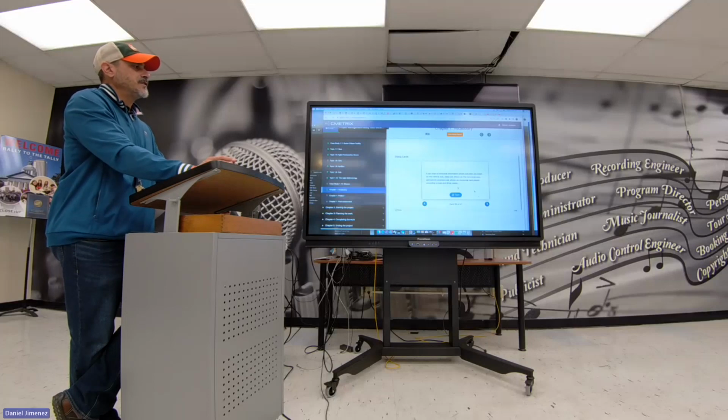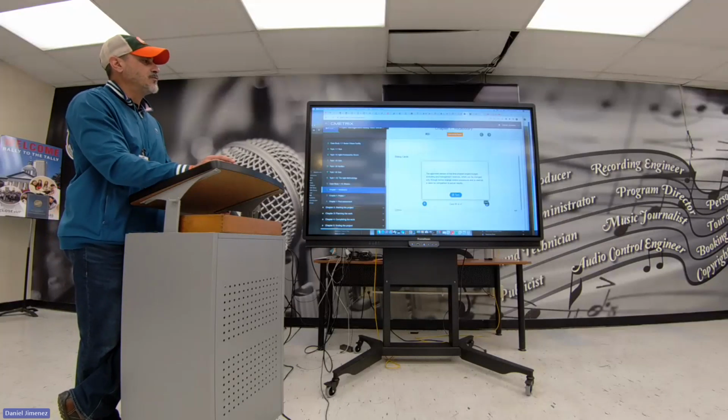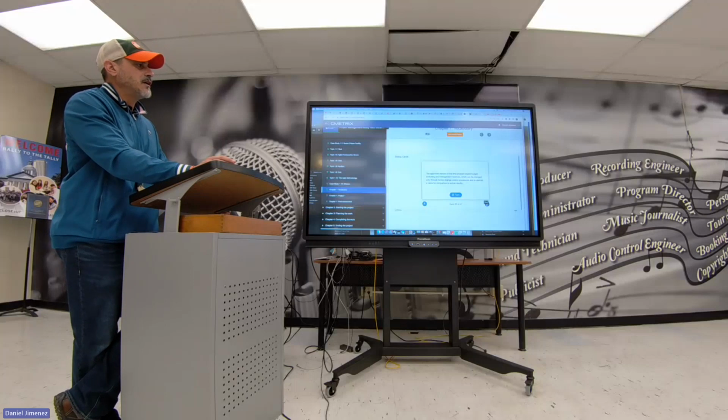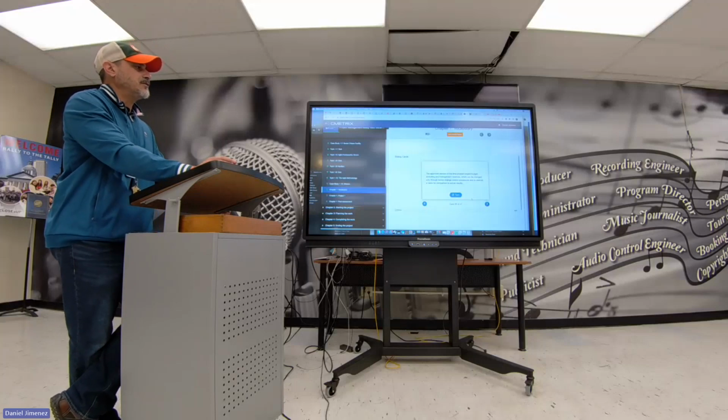A bar chart of scheduled information where activities are listed on the vertical axis, dates are shown on the horizontal axis, and activity durations are shown as horizontal bars placed according to start and finish dates is called a Gantt chart. The approved version of the time-phased project budget, excluding any management reserves, which can be changed only through formal change control procedures and is used as a basis for comparison to actual results, is the cost baseline.